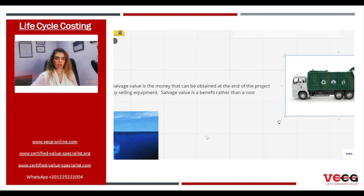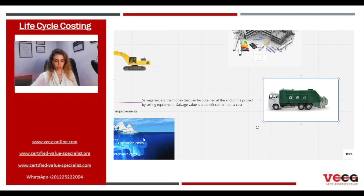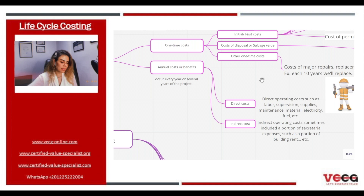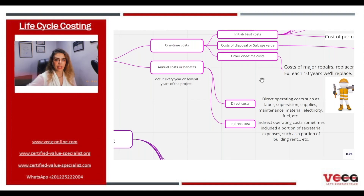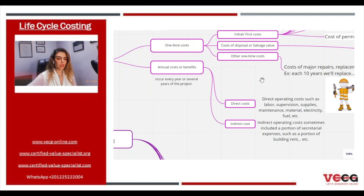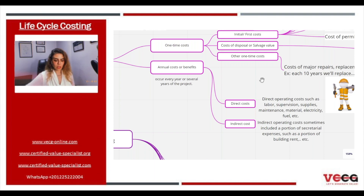We also have other one-time costs, which are costs of major repair, replacement, alteration, or other cyclical improvements. For example, each 10 years we will do a major repair and replacement to maintain the facility. So that was the first type of cost.